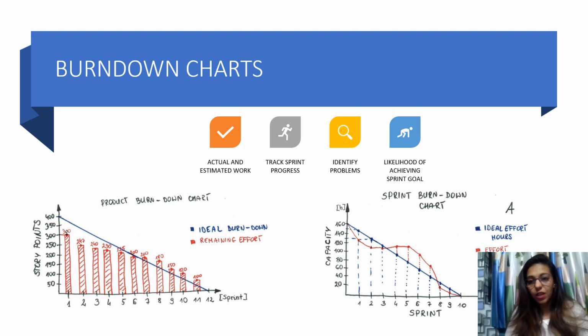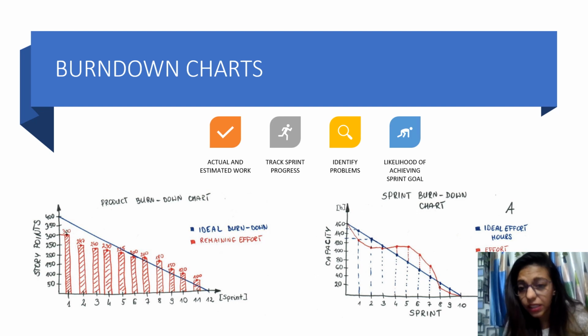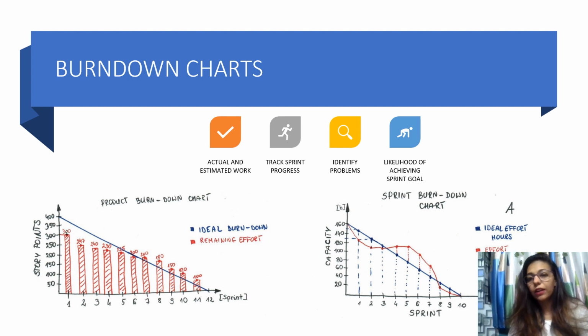Now what does this mean? The actual should be a straight slope line, which means we are completing all the allotted story points day wise. But here, we have completed say 150 points within a span of less than 2 days. At day 2 we should have completed this much, but we have completed it early. So we are completing it early.